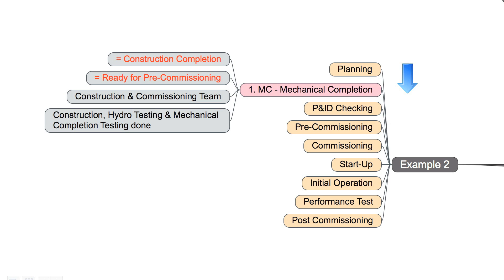mechanical completion testing done, and the P&ID checking usually takes place at the same time. So mechanical completion in this example means ready for pre-commissioning. I will start with pre-commissioning activities after mechanical completion milestone is reached.